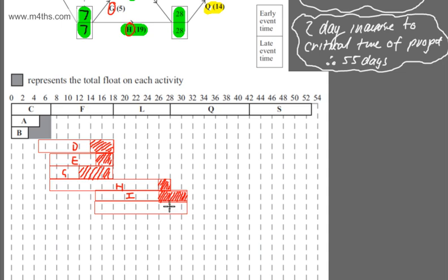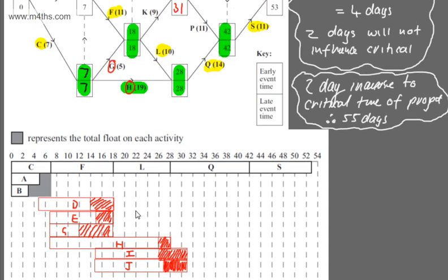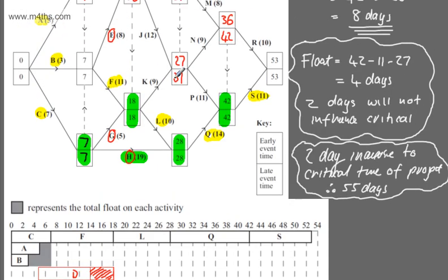And then we got 27. 27 looks to be about there. Okay, so that's as good as it's going to look on the screen. Let's just do that. And so that one now is going to be J. J is clearly not part of the critical path, as it's got a float. Critical activities, as we know, have a float of 0. They cannot be delayed, or they'll have a knock-on effect to that time.